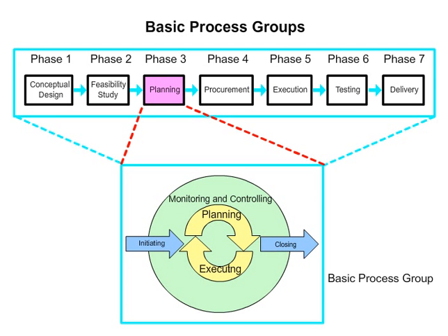5. Closing processes. Confirm the results and final product of the project. Perform any actions to complete the work and disband the team. Summarize the lessons learned from this project's experience. Look back over the project processes and the results of each with the team members and stakeholders. Create a final report.